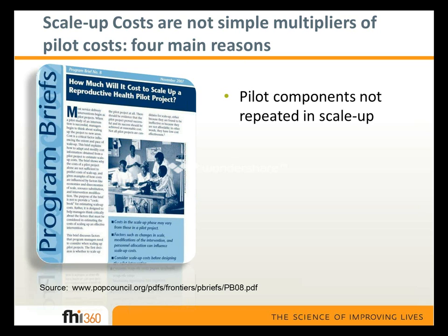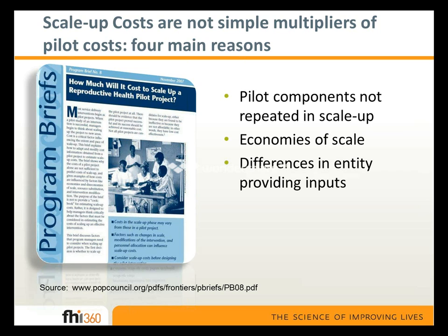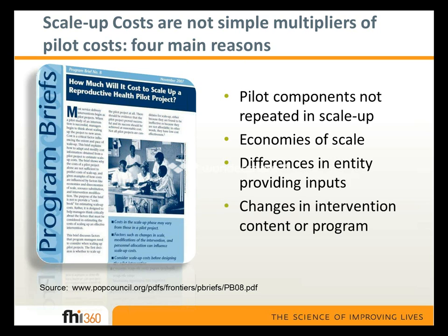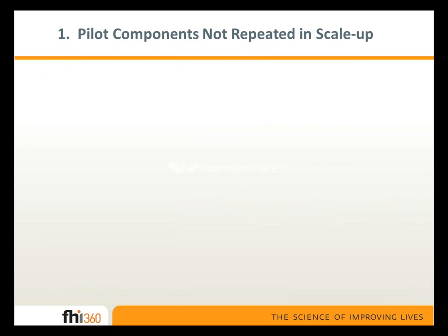So there are 4 main reasons. First of all, that there are some components of the pilot that are not repeated in the scale-up. Secondly, we can encounter economies of scale. Thirdly, there can be differences in the entity providing inputs in the scale-up as opposed to the pilot. And finally, there can be changes in the intervention content or program between the pilot and the scale-up. And I'll cover each one of these in more depth.